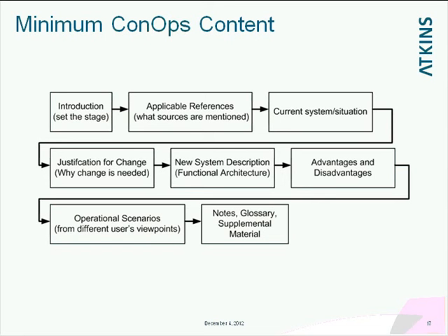And users are people who use the system, people who operate the system, people who manage the system, and people who manage the people managing the system, all different aspects. And what I like to do is I take a scenario and then describe the same situation from different viewpoints of people that are using the system and interacting with it. Then you add notes, glossary, and any supplemental material.